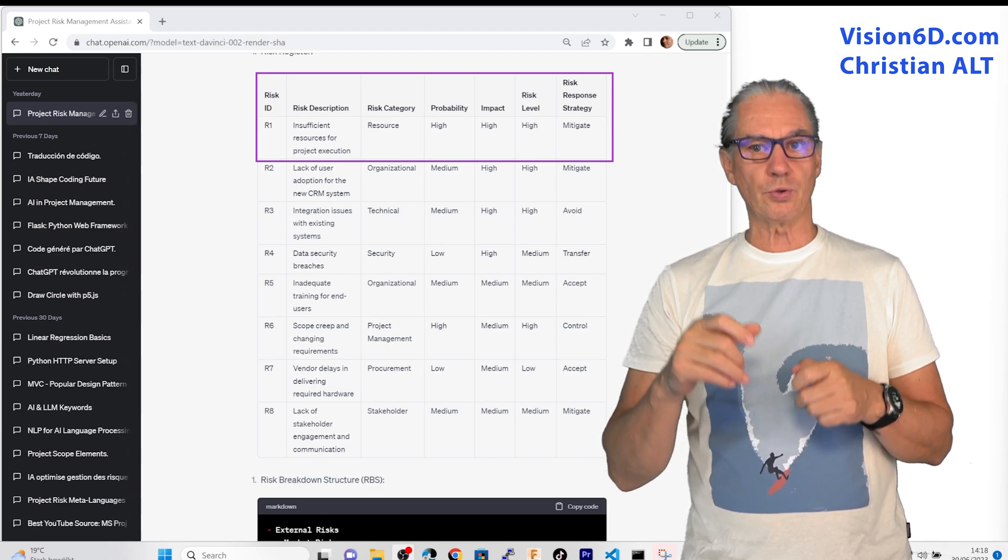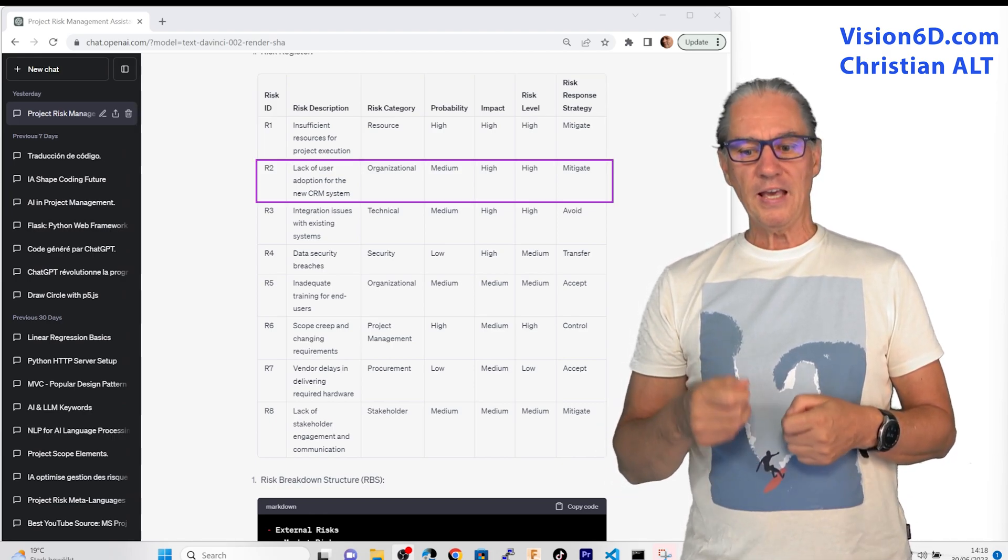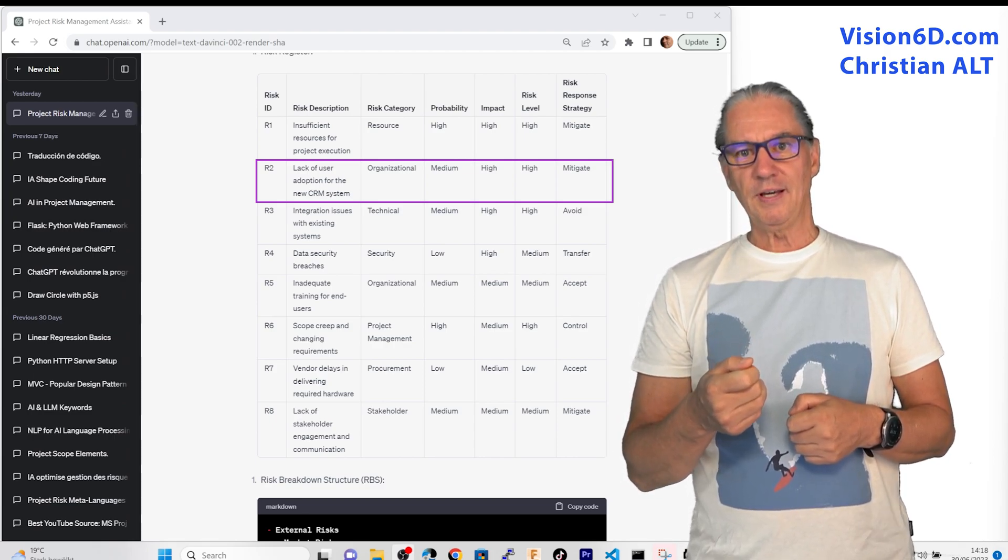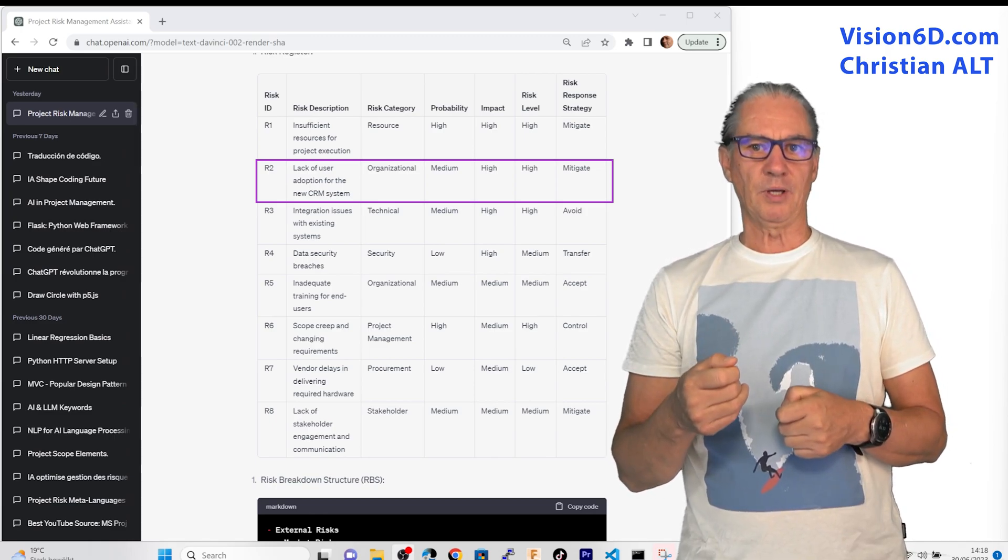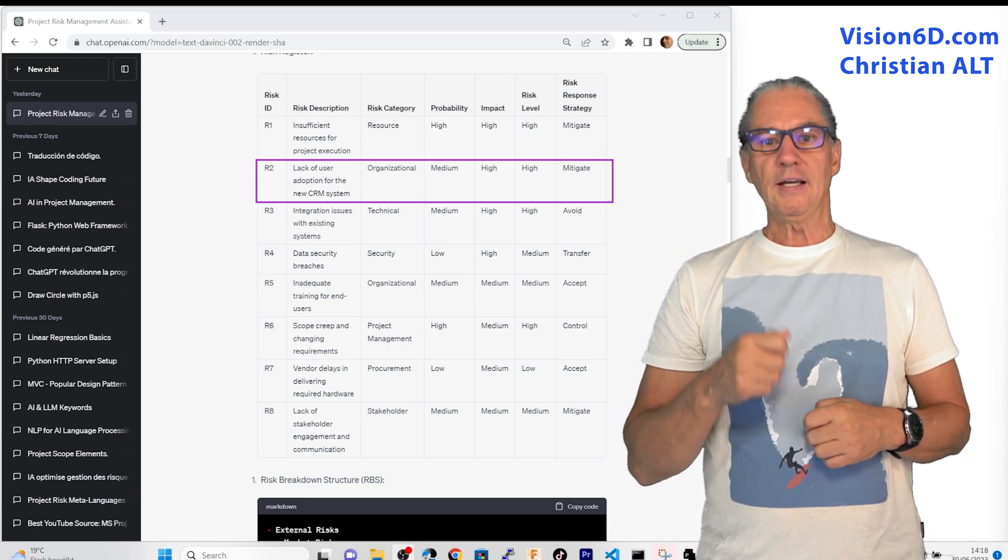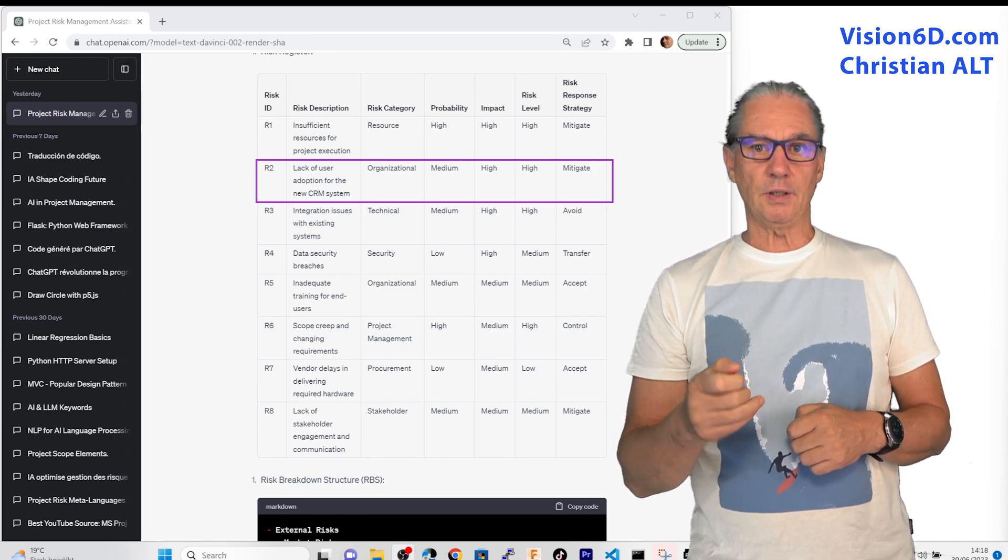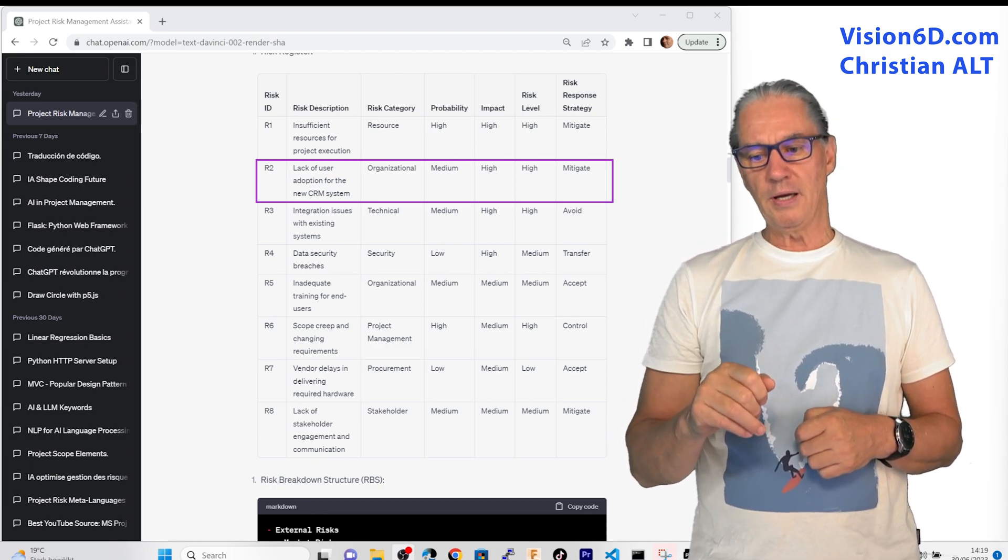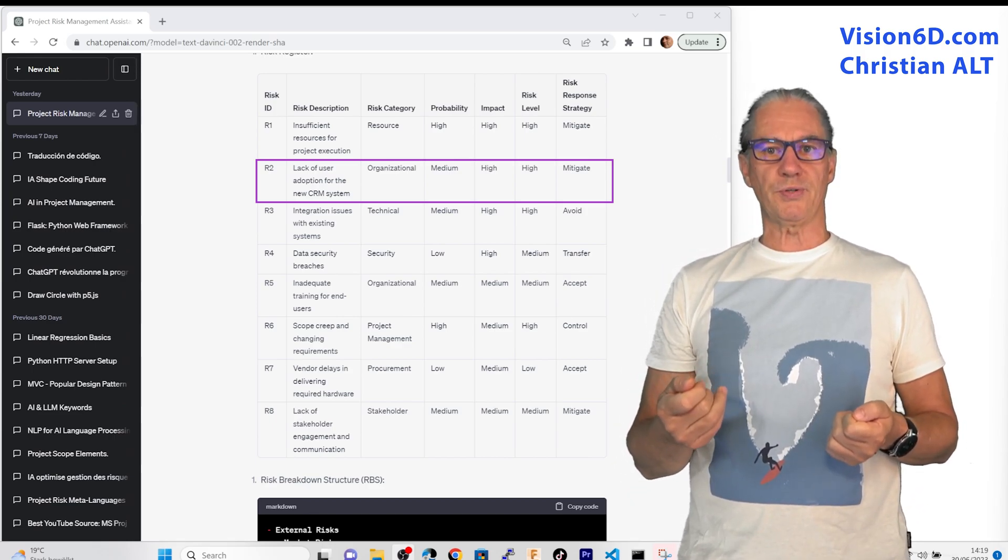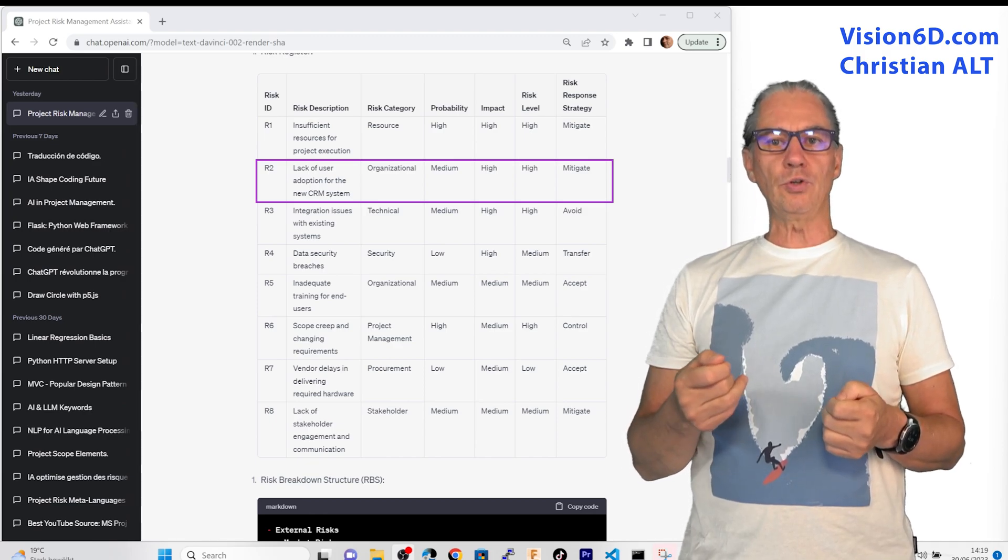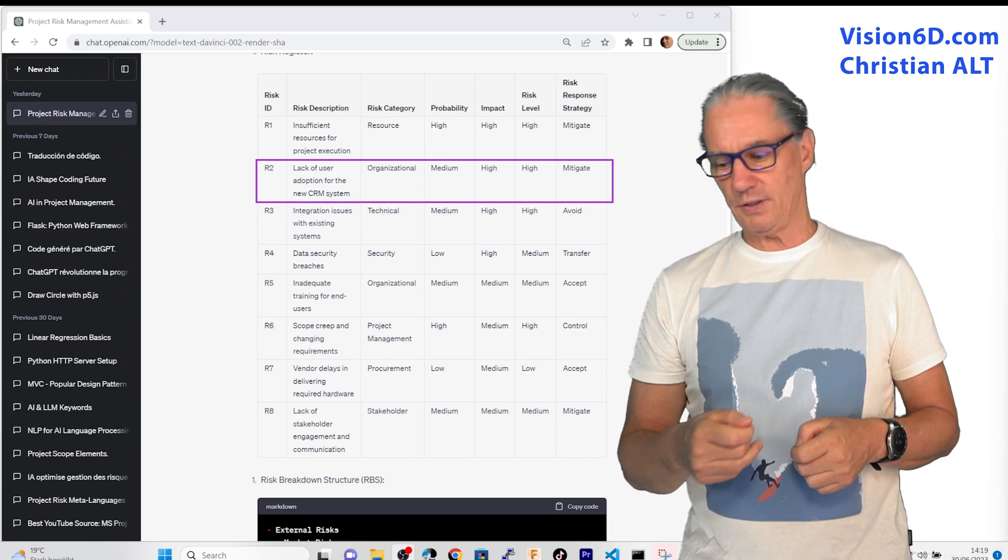If I take the second risk, it's a lack of user adoption by the CRM system. This is all what is concerning change management. This is organizational and the probability is a bit lower than the previous one is medium but the impact if it happens is really high. Of course if your users are not using or not happy in using the new system well you will have difficulties.